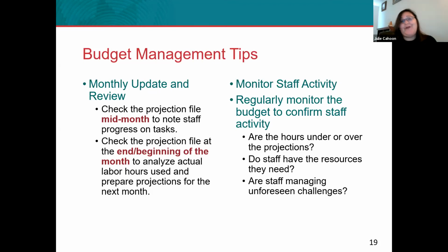likely to be monthly, updates and reviews of your project work. And so that includes looking at your work plan, and seeing what the progress is on those particular tasks and aligning that progress with your budget. Are they working and aligned together? So the work plan progress should be matching your budget progress as well. And so you'll just want to have consistent review of your budget.